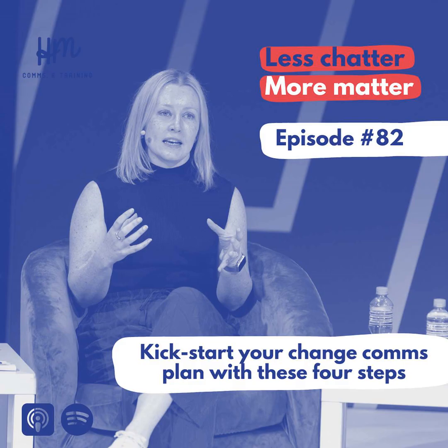And you might need to keep them informed about what's going on, but that's probably about it. Now, sometimes these could be suppliers, media, maybe even board members. The quadrant above that at the top left is high control, but low impact. So this is our change sponsors or change influencers bucket. They help shape the change, but are personally not impacted by it, and often they are C-suite leaders. Then once you have those two, on the top right, you've got those who are highly impacted, but also have a high level of control. These people are important. They are your change leaders.